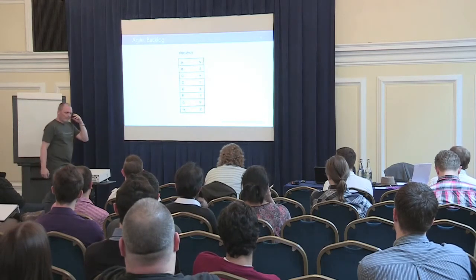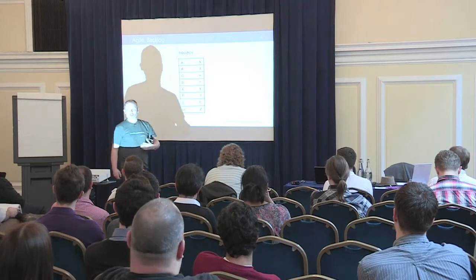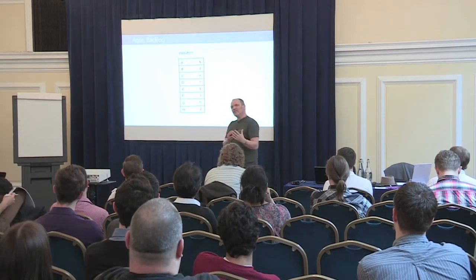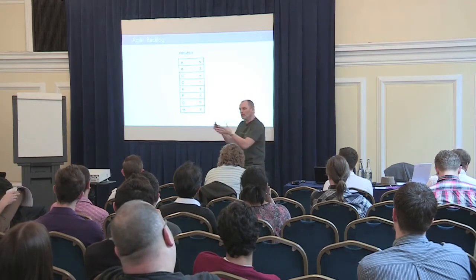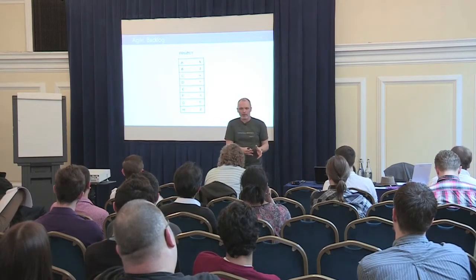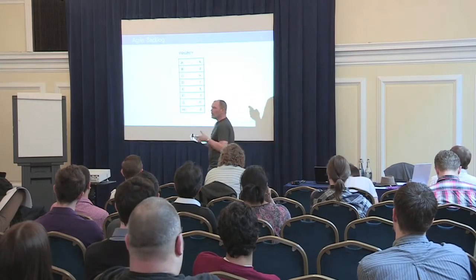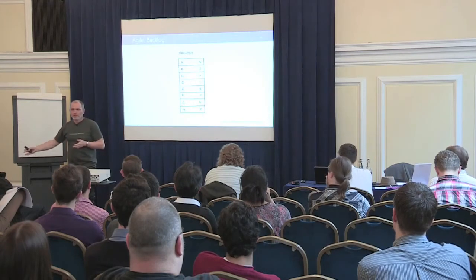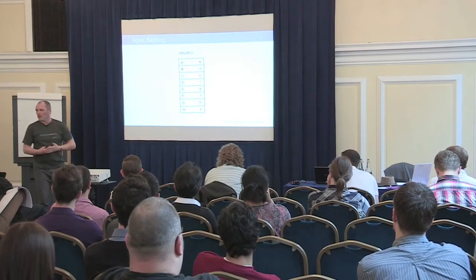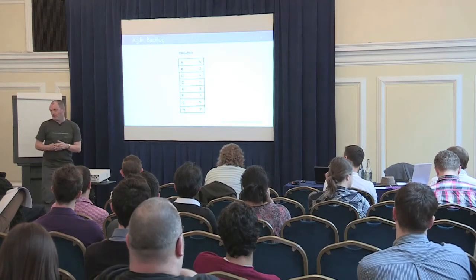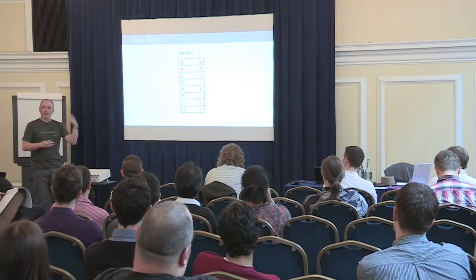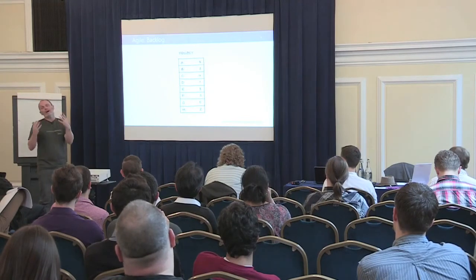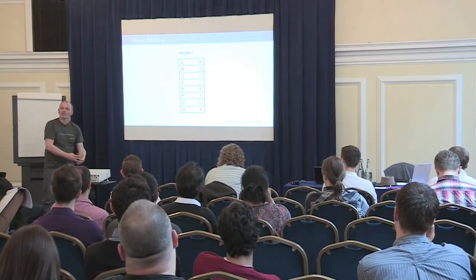So basically, an Agile project usually starts with a backlog. A lot of these Agile approaches just say, okay, you're going to start the project, the backlog is already there. The backlog is basically a list of the things that you can do to get to the end of the project. It's the functionality that you need to build. It's the other work items that you need to do, such as setting up your development environment, setting up a test environment, thinking about UI guidelines, thinking about a baseline architecture, getting your requirements out, stuff like that.